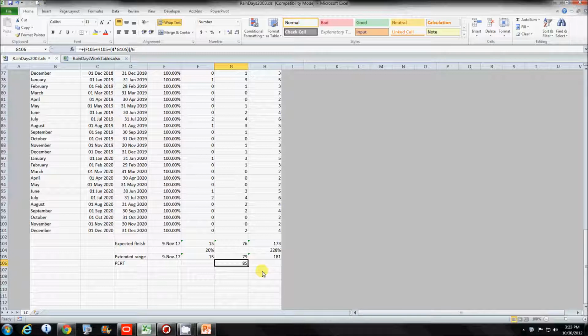So we will take this 85 days, add that to our existing calendar, which in this case had an elapsed time of 1,516 days. And we're going to add the 85 to that, and then we're going to divide by the 86, and we come up with a factor of 1.054. And just something to remember for later on.